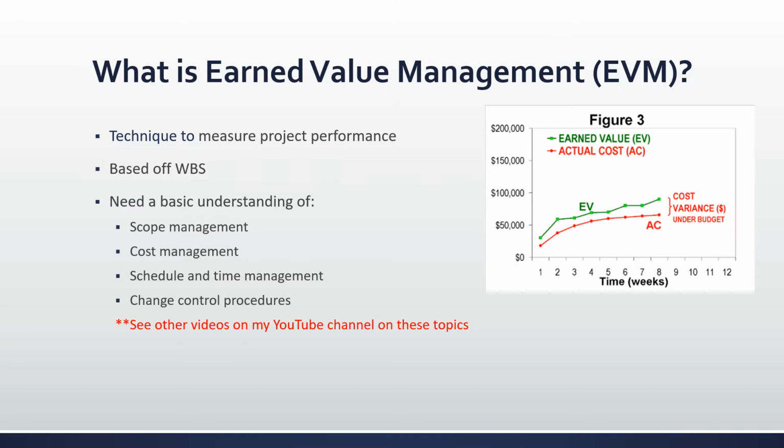For each scope item, you need to have a predicted budget. This is the charge or cost of each deliverable. You'll need a detailed budget that breaks down to component level so that you can accurately track project spending against the anticipated levels. Schedule and time management.